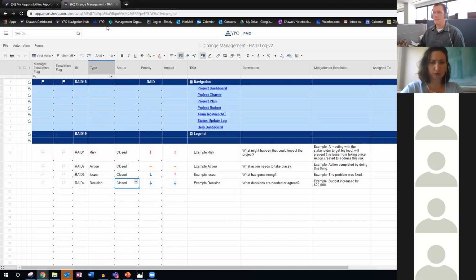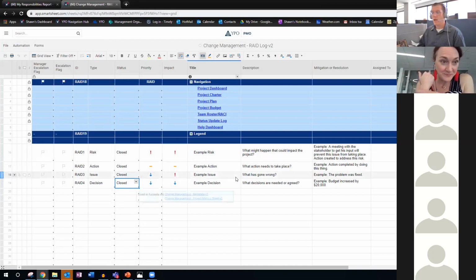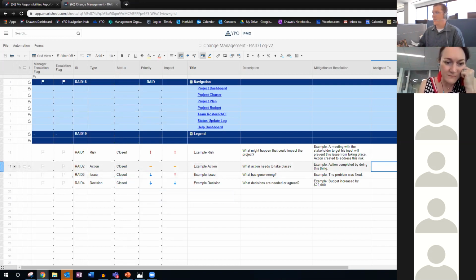Does every project or focus topic need to have RAID items entered? The RAID items would be any issues or any actions. So if you have anything that needs to be tracked, this is a place to do it. Whenever I'm on a project call, I always have the RAID log open because while we're on the call, there are going to be some actions that come up. In my experience, if you have an action and you don't assign a name and you don't assign a date, it won't get done. If you don't assign those two, you might as well not even take down the action. This is the only way an action ever gets taken care of: by assigning a date and assigning a name.